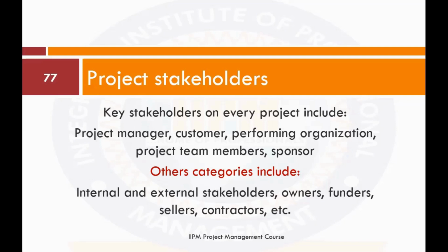I said the first one is for you to identify your stakeholders. So if you can create a table where on your first column you have stakeholders, on your second column you have the categories of stakeholders. Like I said, you can put them as high impact, moderate impact, and low impact stakeholders. Then you have the definition of the impacts each of those categories is bringing. And then on the last column, you have your strategy for managing them. Let me go through this again.